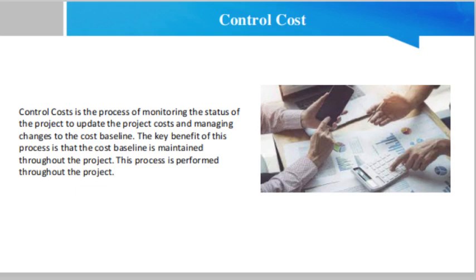ensuring that cost expenditures do not exceed the authorized funding by period, by WBS component, by activity and in total. Monitoring cost performance to isolate and understand the variances from the approved cost baseline. Monitoring work performance against funds expended, preventing unapproved changes from being included in the reported cost or resource usage. Informing appropriate stakeholders of all approved changes and associated costs, and bringing expected cost overruns within acceptable limits.